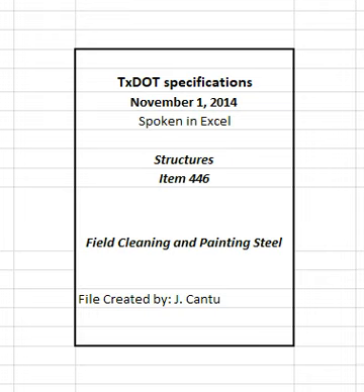Submit SSPCQP applications and proof of acceptance before beginning work, or provide SSPCQP7 certification when required on the plans. Inform the engineer within 1 business day of all scheduled or unannounced inspections or audits by SSPC, OSHA, EPA, TCEQ, or other agencies or organizations. Furnish the engineer a complete copy of all inspection and audit reports and any SSPC DAC actions within 7 days of receipt.